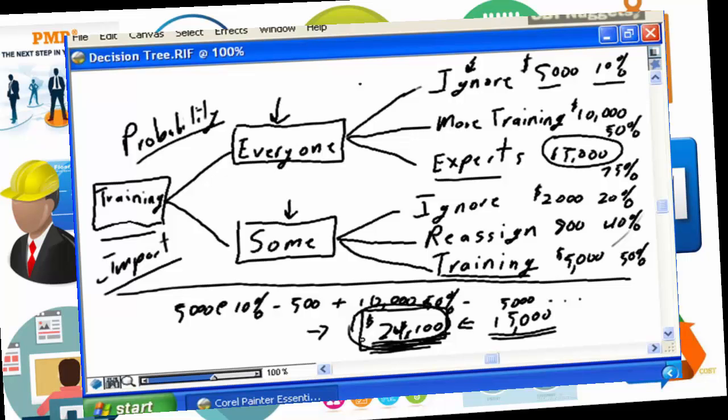that the acceptors are not going to accept the overall project budget, that the project is going to be priced at an unreasonable level, that management and the business is going to say, well, if the project is really going to cost $15 billion, there's no way we're going to take on the project. And I say that with extreme. But the risk is, if you are overly conservative, overly pessimistic with determination of what your appropriate risk allowances should be, you're going to overprice the project, and the project is not going to be approved, and therefore the business itself is going to suffer because there was a valid justification for the project.